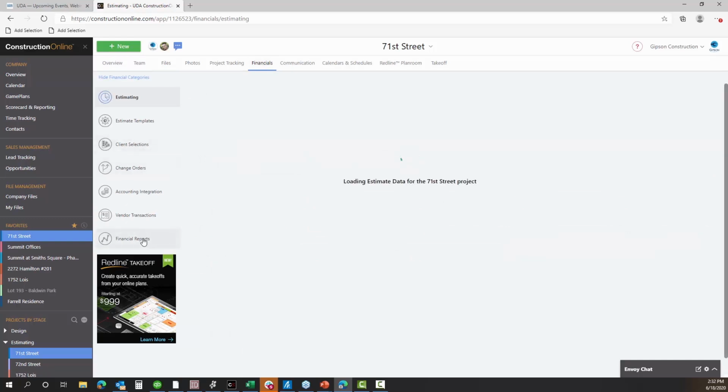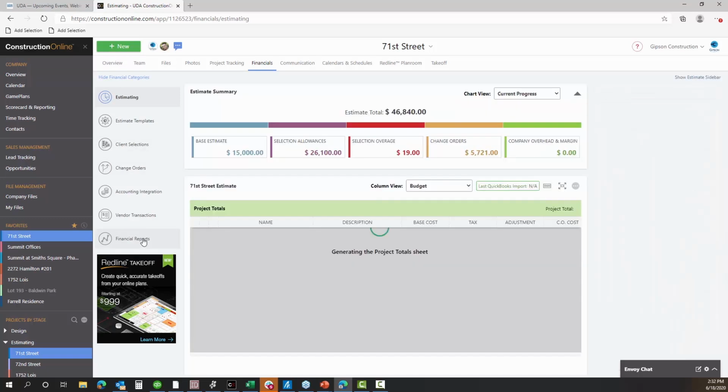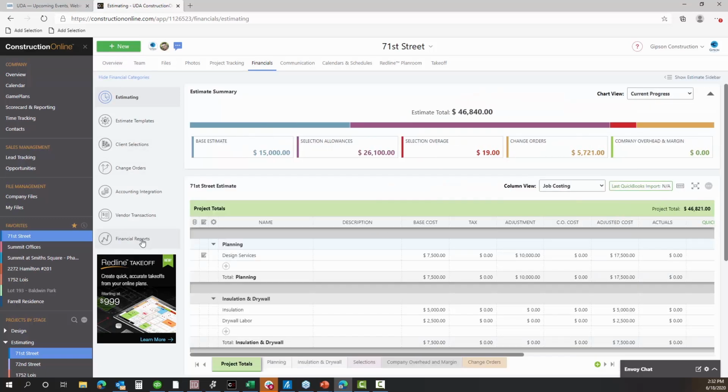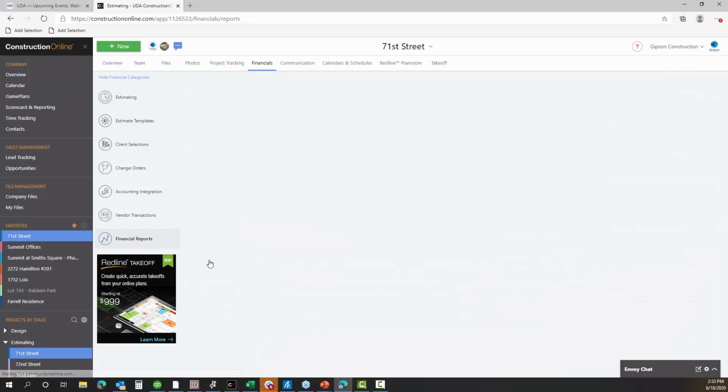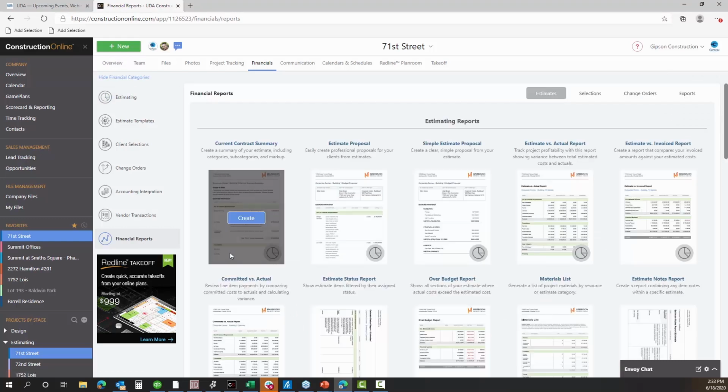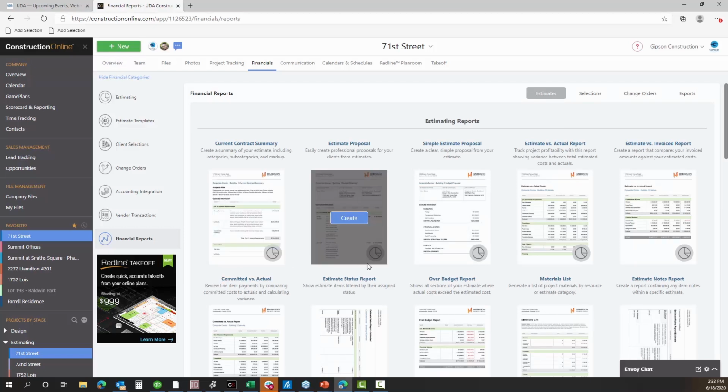Another place where I think people should look is, two other places. One would be, take a look at the schedule, see where you finished in relation to where you thought you would finish. And some of the other reports from a punch list perspective or rework, quality assurance, that sort of thing.